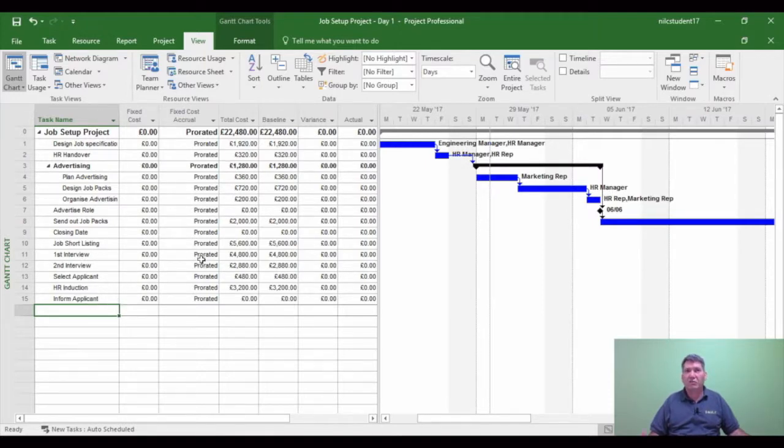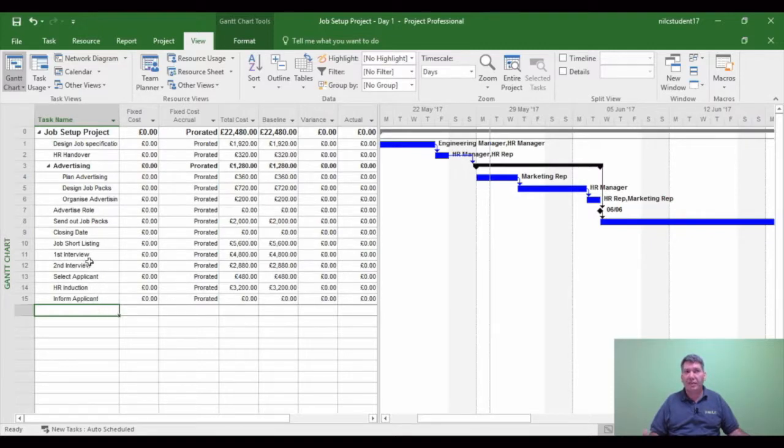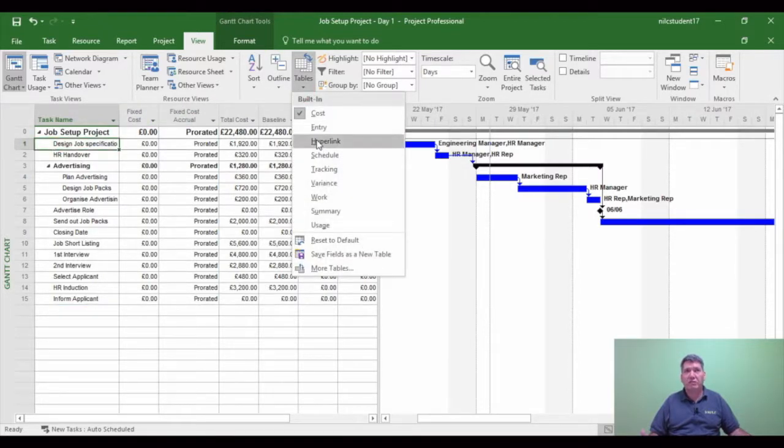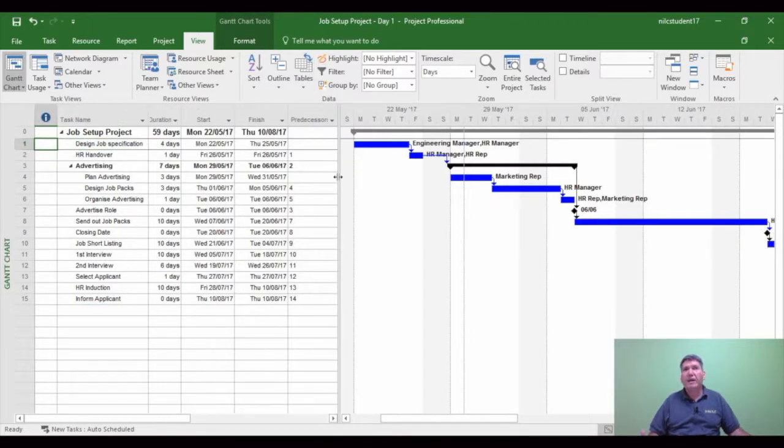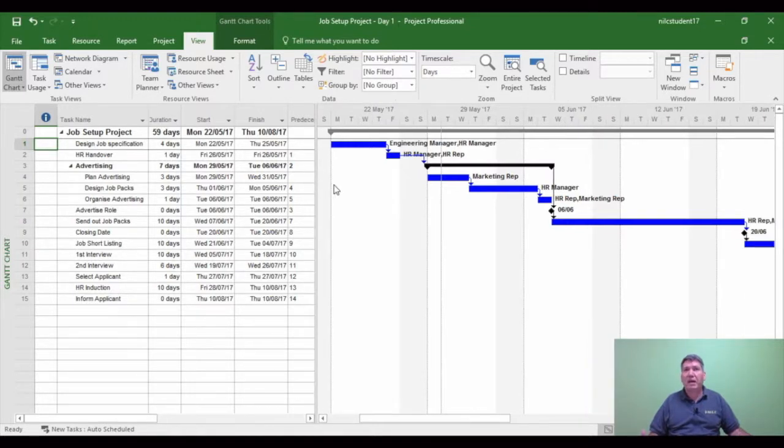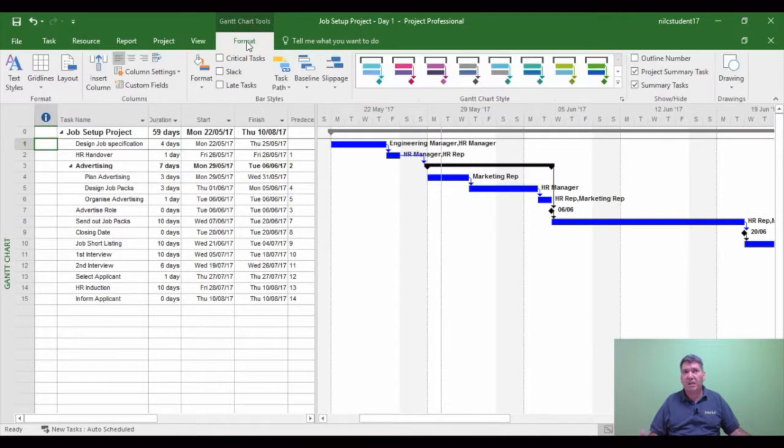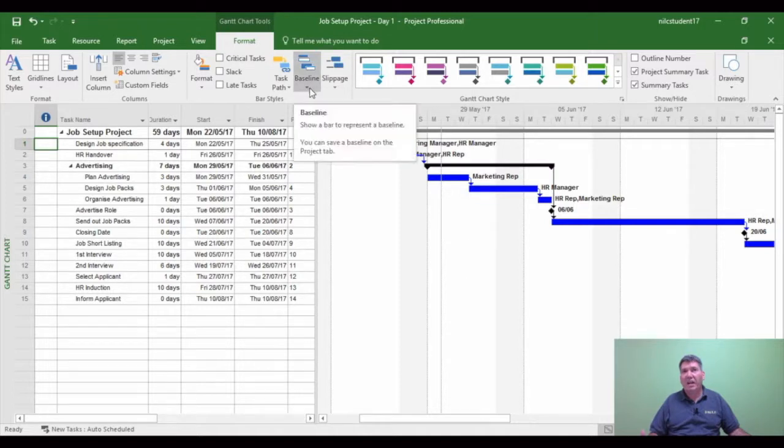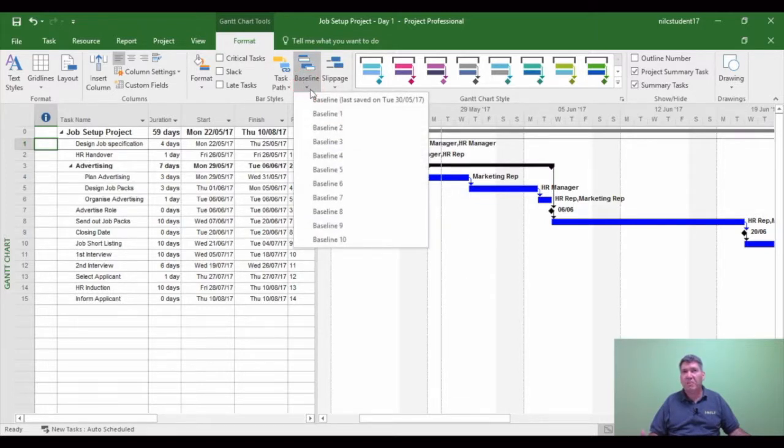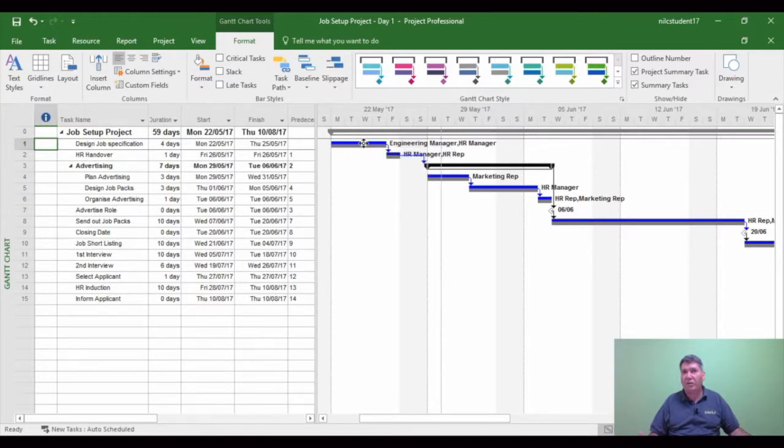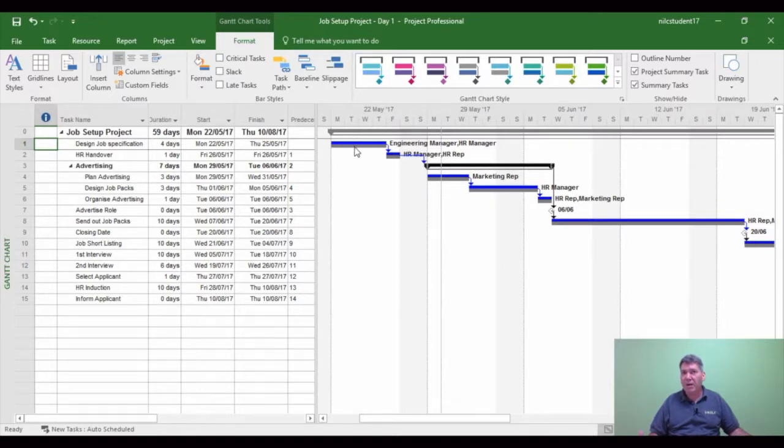Now, one of the guidance that I'd also give you when you've set a baseline is to turn on the baseline graphic. Before I do that, I'm just going to change my tables back to the default settings. So I'm going to change it back to entry table. Now to set the baseline graphic and display the baseline graphic, that's under the format tab. So format tab. Then you'll see an icon called baseline. Click the little arrow. And then you'll see baseline last saved. If I click that now, now you can see a little grey bar has positioned itself below the blue bar within the chart area of Gantt chart.